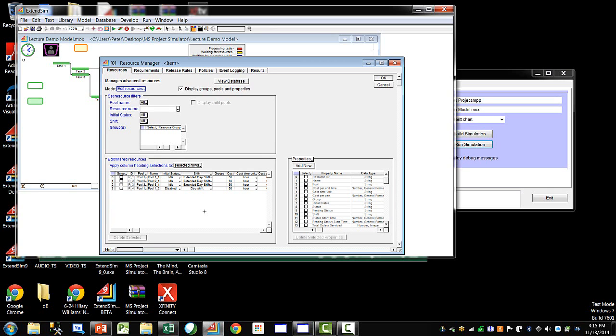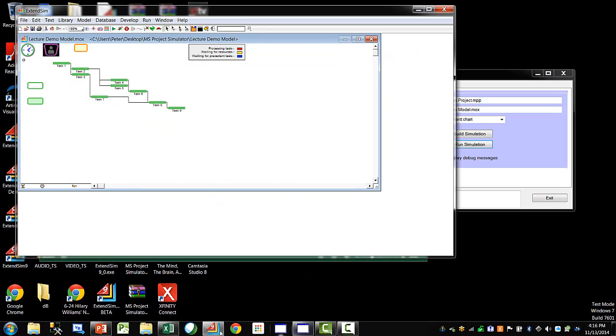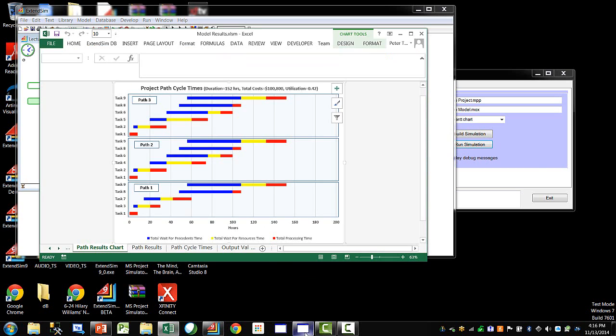So this is the same way of getting capacity in the system as adding a resource. It's just adding more time. We're going to have an equivalent cost factor for adding this capacity by extending the duration of the shift. So 3 resources, longer workday. Let's go back and take a look at what our impact is going to be.